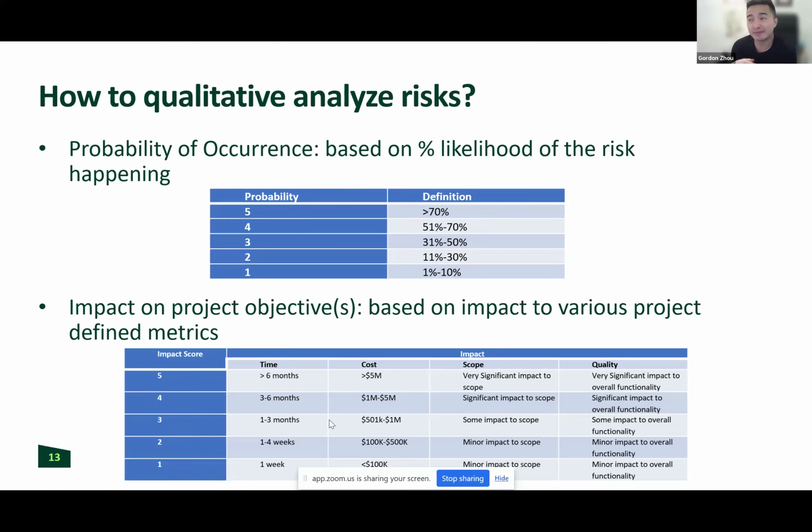It may cause me to have a schedule delay of my project, because now people are working slower, people are moving slower. People are being more careful because they're afraid to slip, and therefore I may see that result in a schedule delay, or I may see that result in more costs.